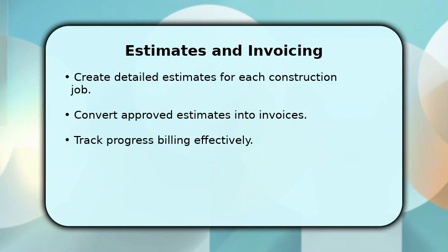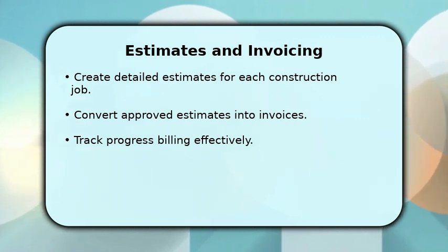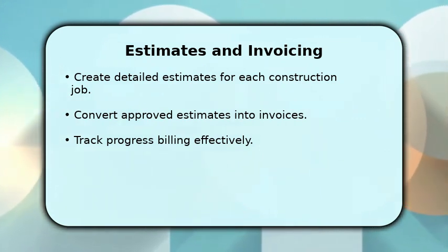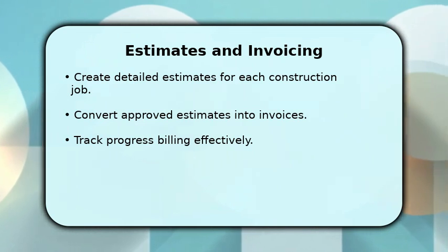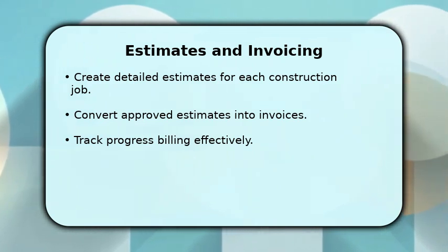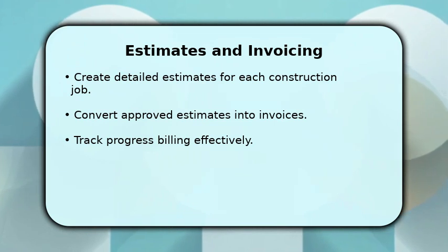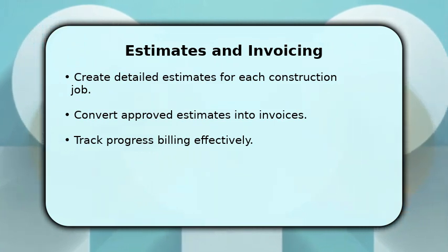QuickBooks allows you to track progress billing, ensuring you invoice clients accurately as work progresses. Regularly generate customer statements to keep clients informed about their outstanding balances and payment due dates.